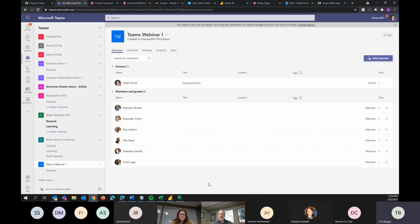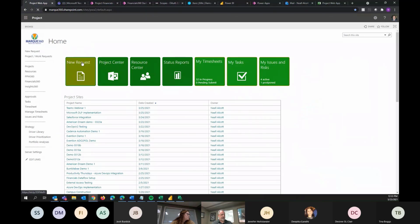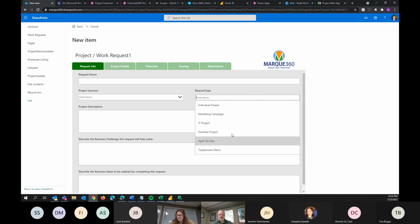So Neil, if there was ever a need to pick and choose which projects get a full-on team site, can you do that through that intake, or would that be different? You can, yeah. So if I go back here, the way I'm controlling it is depending on the type of request or the type of project you're requesting, that triggers whether or not a team is going to be spun up. So for an IT project, it gets a Microsoft team, a project schedule in Project Online, a Planner plan. A marketing campaign, though, might only need a Microsoft team and Planner. It might not need the project. An individual project might just need Project for the web or Project Online and no Microsoft team. So again, it's pretty flexible on how you would want to standardize those types of requests. And then is a team spun up automatically for it. Awesome, thank you.